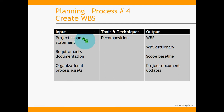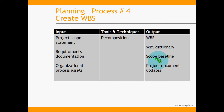While creating the WBS, we have the scope statement, the requirements documentation, and the organizational process assets. The tool and technique is decomposition, and the output is a work breakdown structure and a WBS dictionary. The requirements document along with the finalized WBS becomes the scope baseline. Sometimes while doing the WBS the plan may get updated, or even the charter, because based on progressive elaboration, by the time we reach the WBS stage we have more information and crisper requirements than at the time of the statement of work.